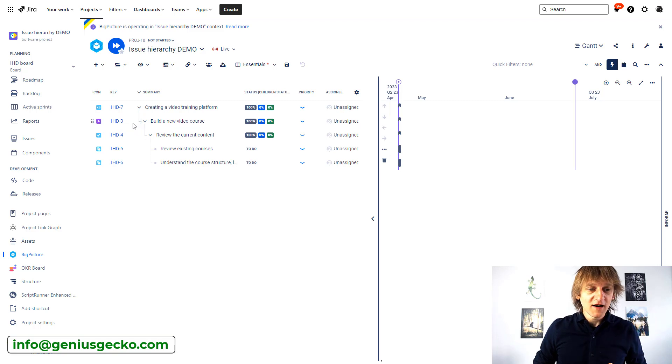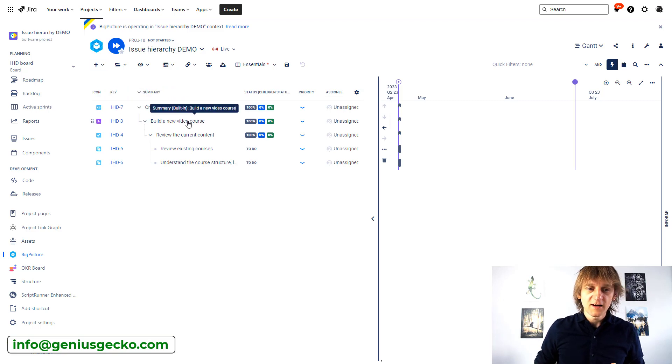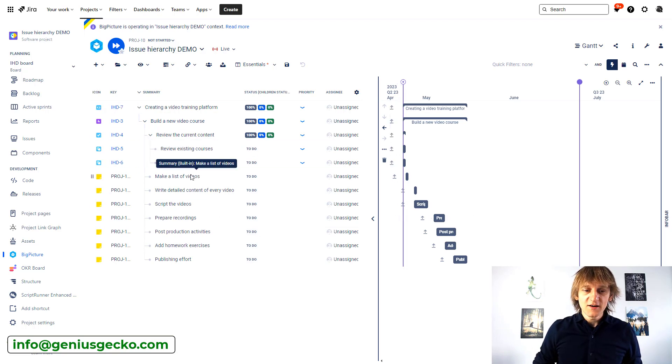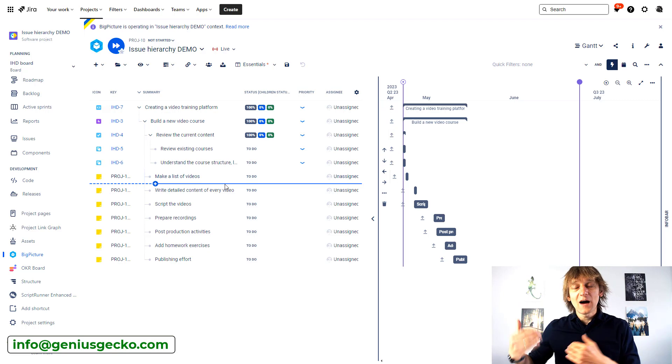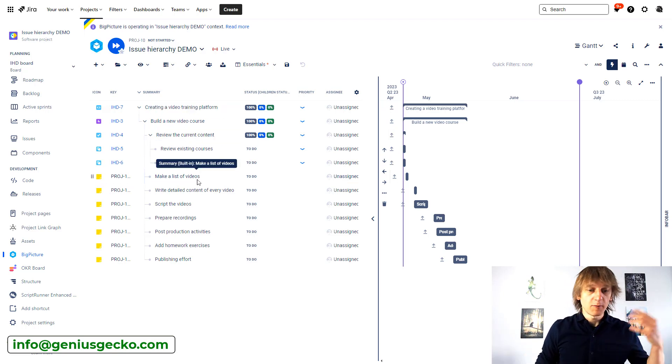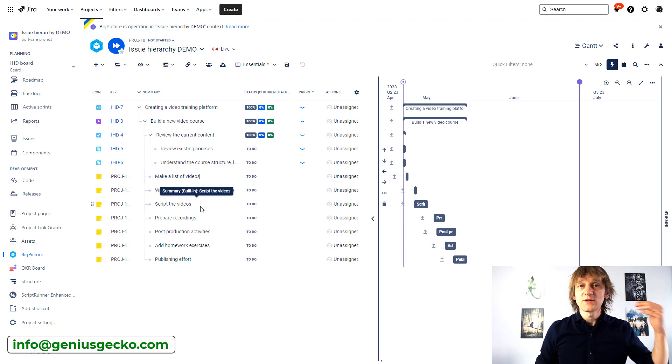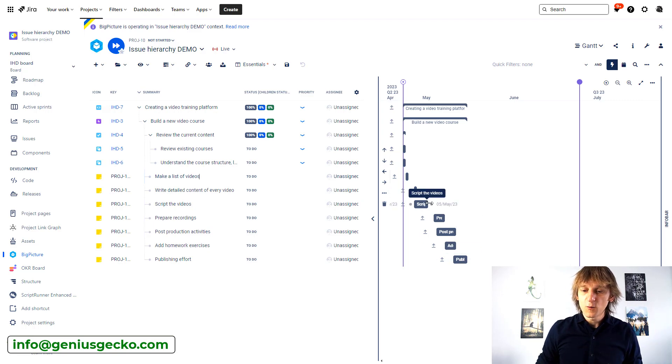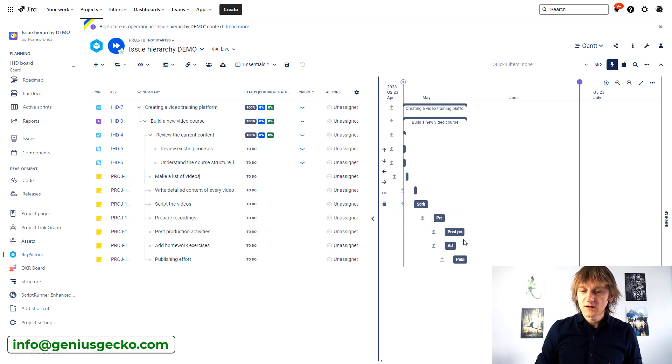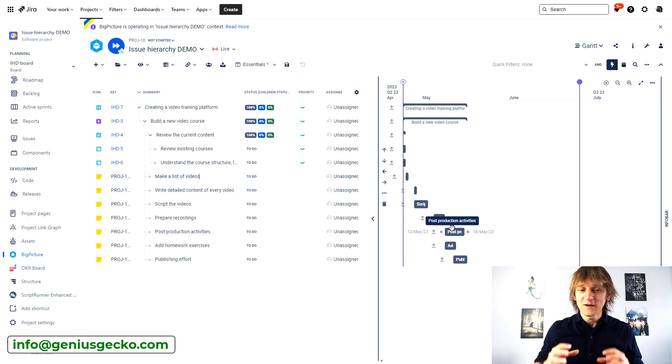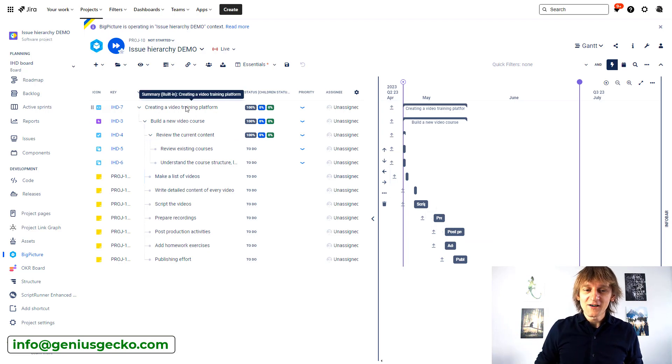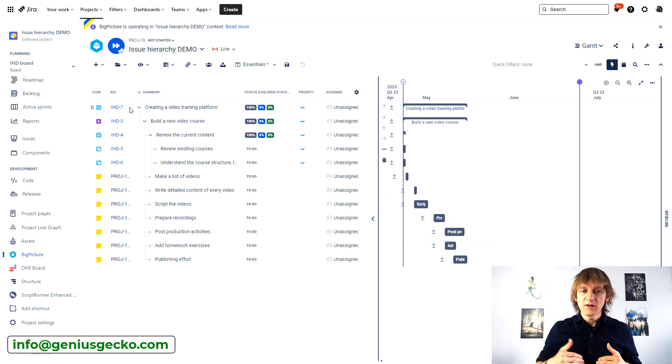Another cool thing that I like about the approach over here is that I can also do this. I can go over here and I can create a bunch of tasks from a template. There you go. So with just one click, I created a whole bunch of new tasks under my Epic that kind of define how I'm going to keep working while building a new video course over here. So I will make a list of videos. I will write detailed content of every video. I will script the videos and so on and so on. They are beautifully placed in time. If I want to now, I can link them together like this and - oh, that was actually a bad link because these tasks were supposed to be overlapping a little bit. Doesn't matter. You know how quickly you can progress from your higher level of the hierarchy to the lowest level.